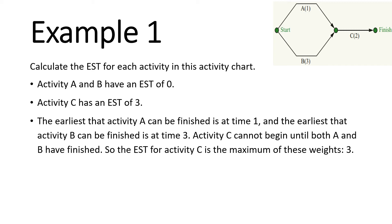Then we can commence activity C. The earliest starting time for the finished vertex will be three plus the weight of C, which is two. So three plus two equals five.